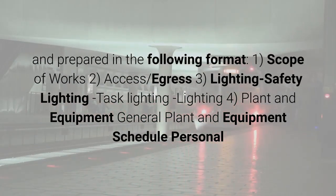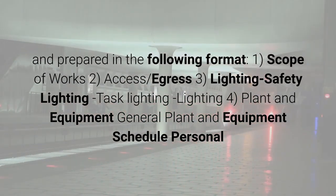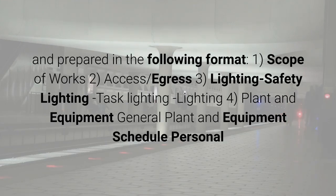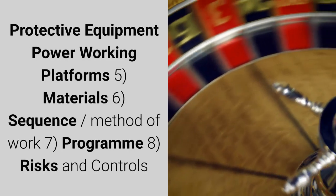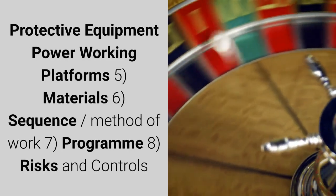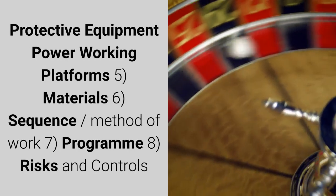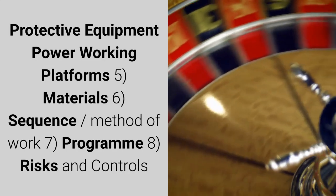1. Scope of works. 2. Access and egress. 3. Lighting — safety lighting, task lighting. 4. Plant and equipment — general plant and equipment schedule, personal protective equipment, power, working platforms. 5. Materials. 6. Sequence and method of work.